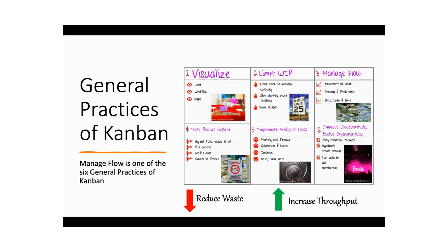When you limit the WIP and create a pull system, you only pull work when there is capacity available for pulling that work. You follow the agile concept of stop starting and start finishing — finish the work you have in hand first, rather than starting new work and keeping it waiting. You start looking at how to generate value from the work you are doing.